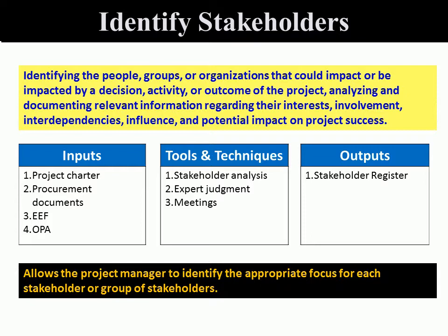Because if you don't know who your stakeholders are, if they are poorly identified or incomplete at that, what you can have is a high risk to your project. Because let's say you did not include a safety officer in your identification of stakeholders, or you didn't include some other key individual, and then somewhere during your project planning or execution, things come up and these stakeholders weren't involved, and it can cause the project to have delays. The project can suffer unduly. So even before going into planning, your stakeholders must be identified.